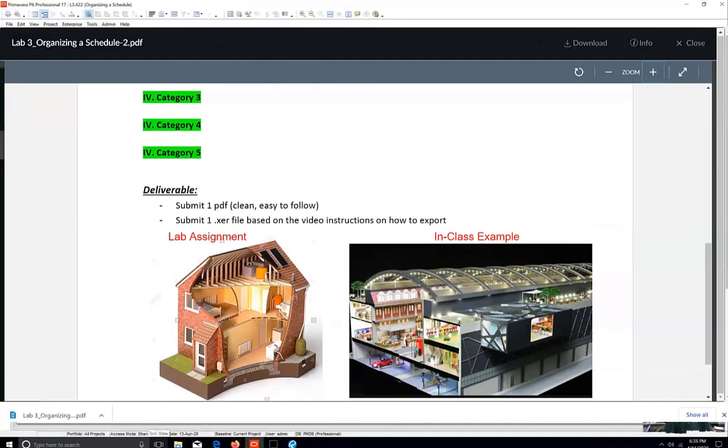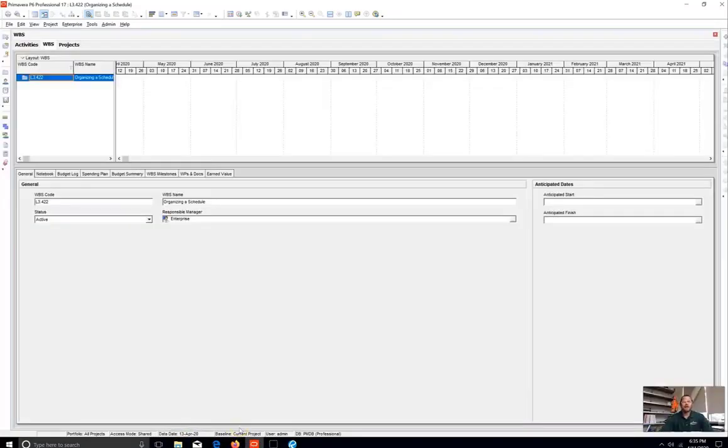The generic ones, from the AGC or ASEE, the different standards, just like the Architectural Institute, AIA, they have a whole bunch of different tiers. The main ones you hear there are deep foundations, substructure, superstructure, exterior, interior finishes. So they have the different breakdown there, but we're going to get a little bit more specific.